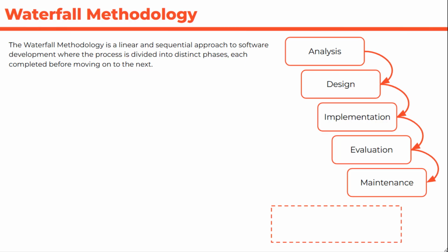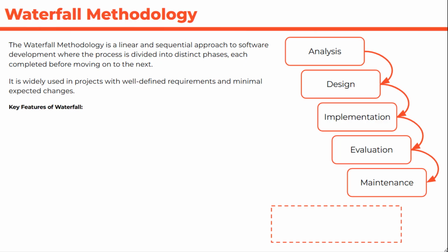And I'll point out here that you must complete the stage before moving on to the next one. And it's that rigid that it can also mess with your timeline, which is a real problem. It's widely used in projects with well-defined requirements and minimal expected changes. So waterfall is not good for requirement changes.